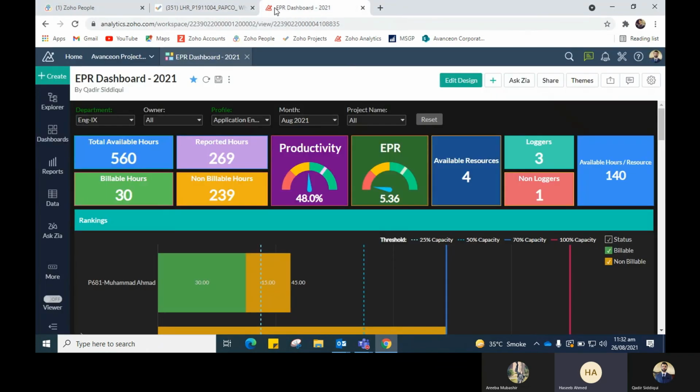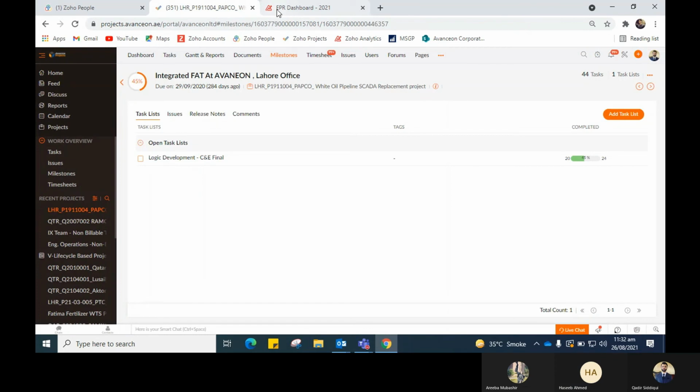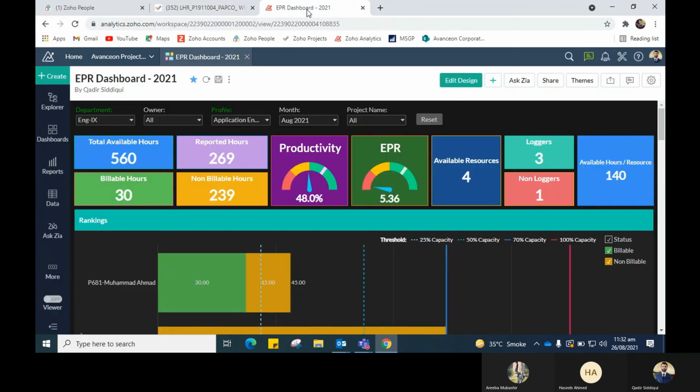Yes, we have two types of categories here. We can list any task under internal or external type. If the task is internal, then when we export the schedule, those internal tasks are not going to be listed in the client report.